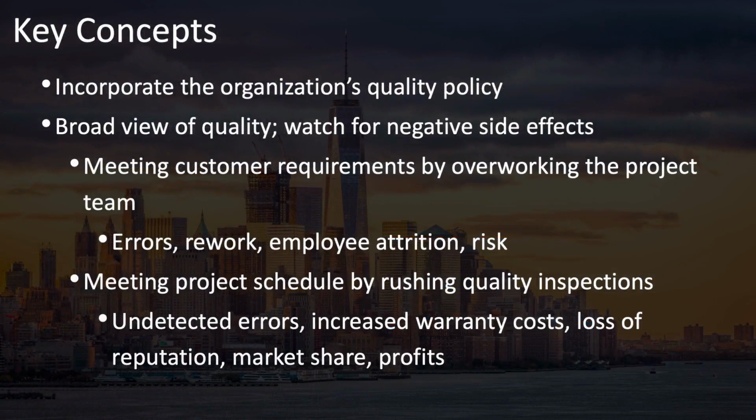As you plan for quality, it's essential that you incorporate your organization's quality policies into your project's quality management plan. You'll need to get with your PMO, program, portfolio, project sponsor, other project managers, and anyone else that can direct you to these organizational quality policies, procedures, guidelines, templates, and standards. And remember that these need to be tailored to the specific deliverables and needs of your project.